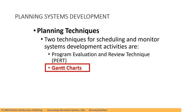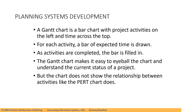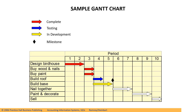We also have the Gantt chart, which is another technique for scheduling and monitoring system development activities. A Gantt chart is a bar chart with project activities on the left and time across the top. For each activity, a bar of expected time is drawn. As activities are completed, the bar is filled in. The Gantt chart makes it easy to eyeball the chart and understand the current status of the project, but the chart does not show the relationship between activities like the PERT chart does. In our example Gantt chart, you can put labels — if it's complete it's red, testing is blue, in development is yellow, and there is a milestone. However, in the Gantt chart there are no relationships shown, unlike in PERT.